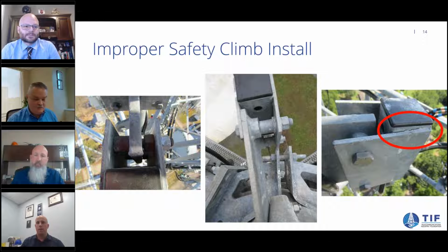Well, and Ryan, time is money, right? Granted, a lot of these were caught in that maintenance and condition assessment, but how frustrated have you ever been when you get out to a site that you need to install some new equipment on and you go to inspect the safety climb and it turns out it's tagged out? Now you have to design a different fall protection plan and it's going to take you more time to complete your scope of work. If we had quality closeout documentation, that post-installation inspection, we could have had this addressed before you ever got to site.